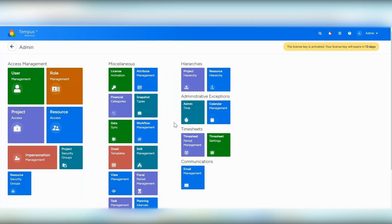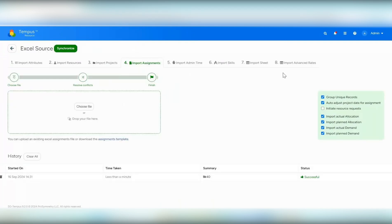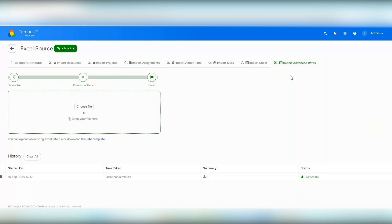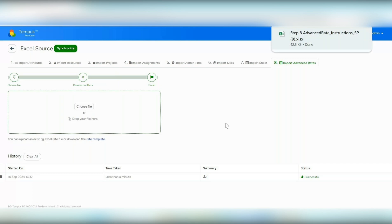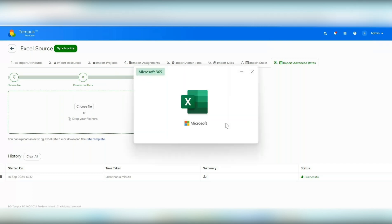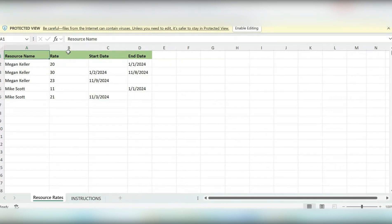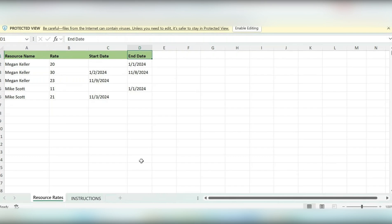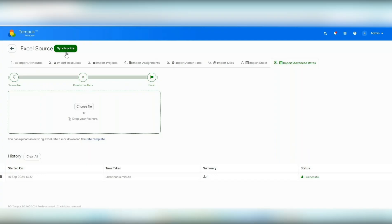Another update is within data sync — we added a new import type called import advanced rates. This allows you to import advanced rates in bulk for multiple resources at once. You download the rate template, which has four columns: resource name, rate, start date, and end date. You fill in the resource names that need advanced rates, the rate information, and the start and end dates for when that rate should be in effect. Once filled out, you import it as normal.